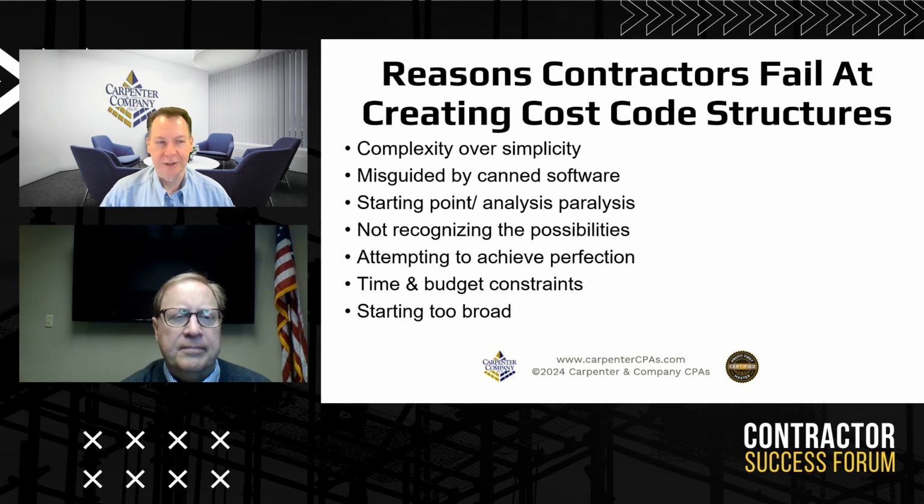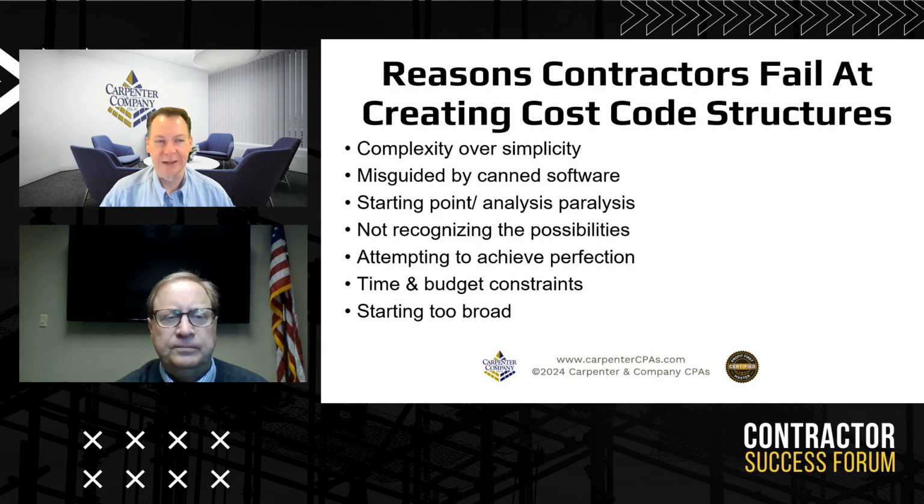A lot of my contractors will tell me they've got a gut feel. They know how their jobs are doing. And usually they do, they know when one's going bad. But sometimes they are fooled by thinking that the big jobs are the ones that are profitable. When we get a good cost code structure in there and look at it a year later, they find out the things they thought were making them money were actually costing them a lot of margin as well as costing extra overhead.